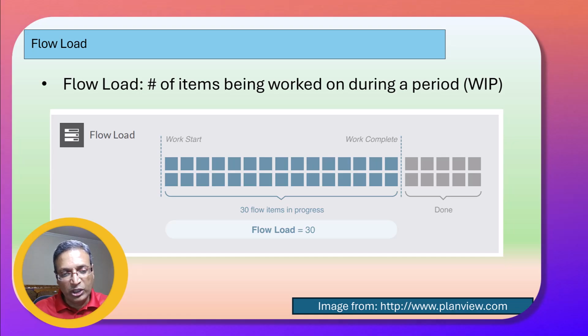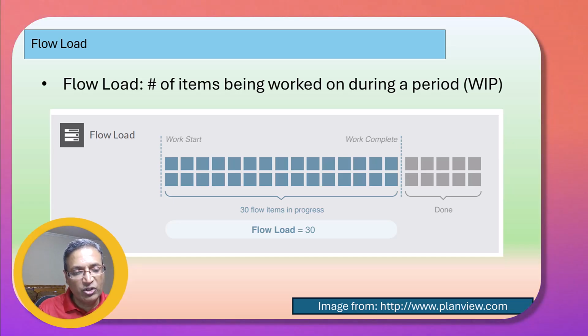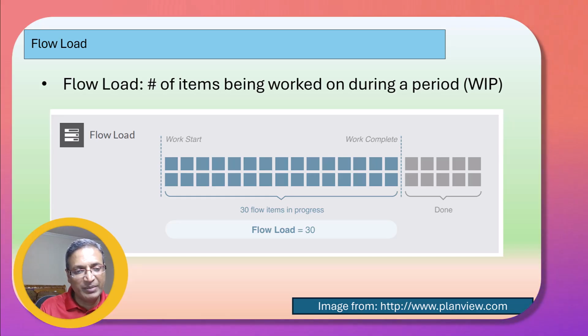context switch. You also don't want to completely allocate your team capacity to work items. You may want to only allocate maybe 80%. Sometimes if there is a time crunch, maybe 90%, if there is no unplanned work coming your way, but I would still try to target 80% so that it allows for some leeway when there's unplanned work or unknown dependencies that may show up.